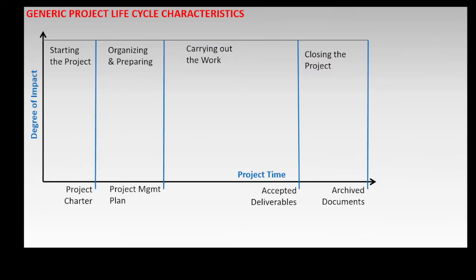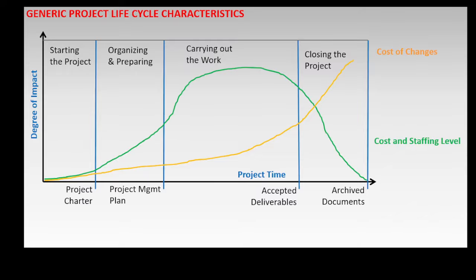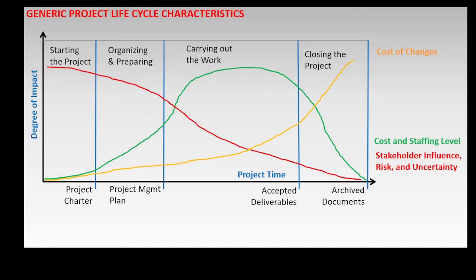The generic project life cycle characteristics are: cost of changes, which is lowest when starting the project and increases as the project progresses; project cost and staffing levels, which are low at the start of the project, maximum when carrying out the project work, and could decrease during project closure; and stakeholder influence, risk, and uncertainty, which are higher at the start of the project and decrease as the project progresses.